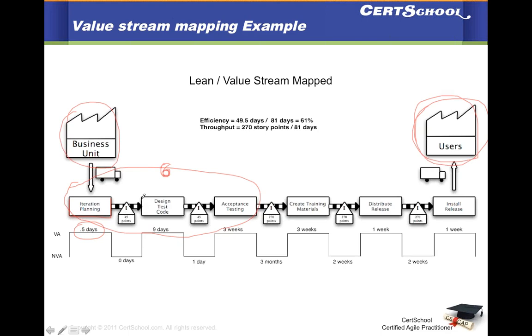Then you do the actual implementation, or this is your true sprint, where you're doing designing, coding, testing, and everything. And it is a 9-day sprint. Okay, this is what you decided is conducive to the domain that you're working in, and you spend 9 days in doing that hard work. Once you have produced these 45 points, you spend about a day in showing it to the customer.